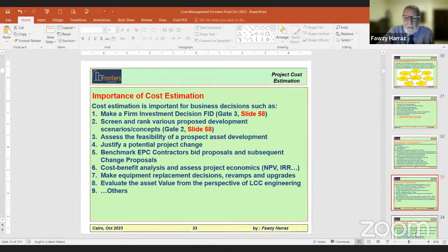One, which is the least severe problem, is lack of knowledge with that contractor, lack of study. He did not study the tender documents properly. He did not check the quantities or specifications. He did not check the resources required, the mobilization cost, the site condition, and all these things. So this badly affected his estimate, taking it to the low side. That's one thing. The worst thing is if the contractor intentionally wants to take the job, even at a loss. That contractor definitely has some financial problems, and he's desperate and very keen to take this job because he's almost running into bankruptcy, and he wants to keep running the business, even if he takes a losing bid.